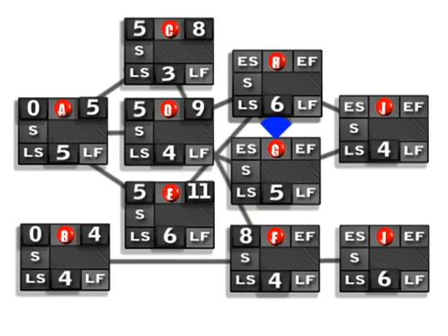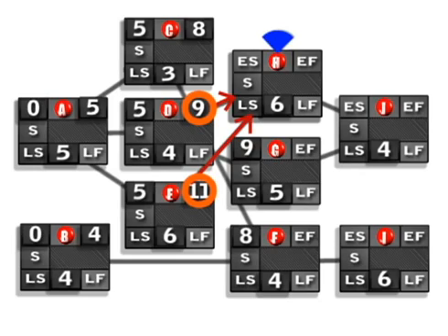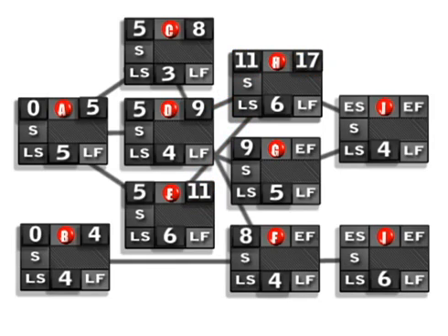For activity G, we only have one predecessor, which is D, so we don't have to make any choice. So for activity G, we're going to have 9 as our early start. For activity H, we have activity D and activity E that feed into H. So we have to look at those early finish times and we have to determine which one is going to be our early start for activity H. Activity D has an early finish of 9 and activity E has an early finish of 11. We're going to choose the higher of the 2, which is going to be 11. 11 plus 6 is 17, 9 plus 5 is 14, and 8 plus 4 is 12.